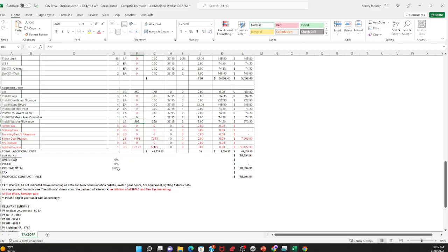Some people do like, oh, I want a $95 hourly rate. I'm like, okay, well, then you're not charging any overhead or profit, because you incorporated it in your hourly rate. You guys are doing just the opposite. You're giving a very low base rate, which it should be. So you can charge a higher overhead, which it is, because you do have overhead.